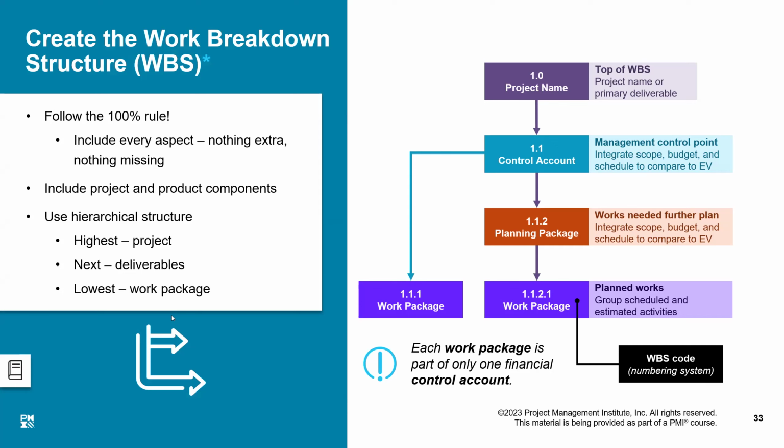Whenever these work packages are referred to, accounting and finance people will refer to them by their work package number, because they may not be technical and may not understand what you are saying. So we say, okay, package 1.1.1 has started. They would know what 1.1.1 is. They'll look in the databases and see the accurate depiction of what it is.